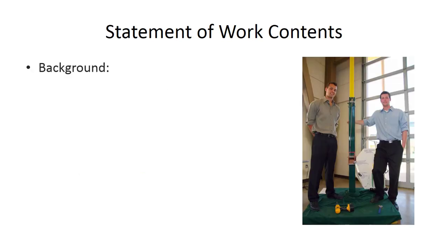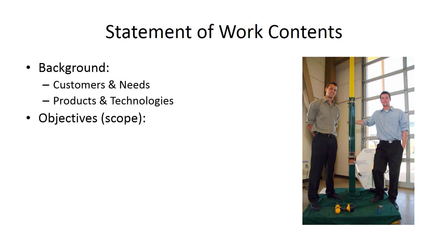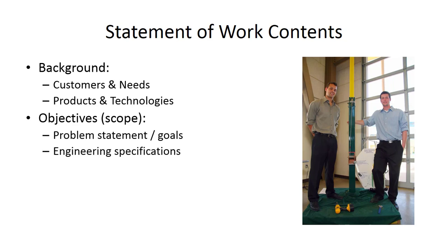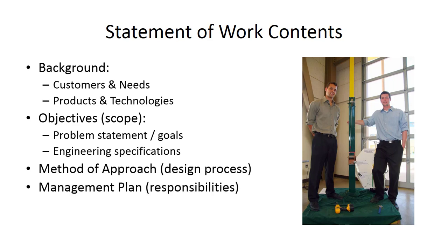Briefly, the statement of work contents include a background section covering customers and their needs, as well as products and technologies used to solve the need in the past and that you might use in the future. There's an objectives section defining scope via a problem statement and goals, plus engineering specifications you will test your final design against. There's a method of approach section describing the design process, a management plan defining major responsibilities and extra resources, and lastly appendices including references, a quality function deployment house of quality, and any other important additions.